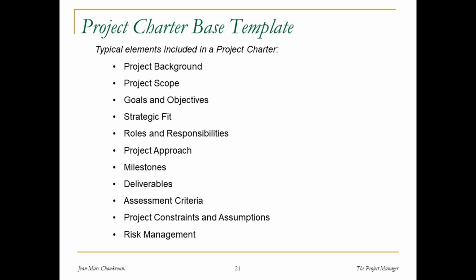This is kind of a template that lists the topics that are typically included in a project charter. Background, scope, goals and objectives, strategic fit. How does that project fit with the strategy of the organization or the mission of the organization? Roles and responsibilities. How we're going to approach the project. In other words, kind of methodology there. What milestones, deliverables, assessment of performance criteria, constraints, assumptions, and risk management. As you can see, that list is an elaboration on the startup checklist that I had you work on last week.